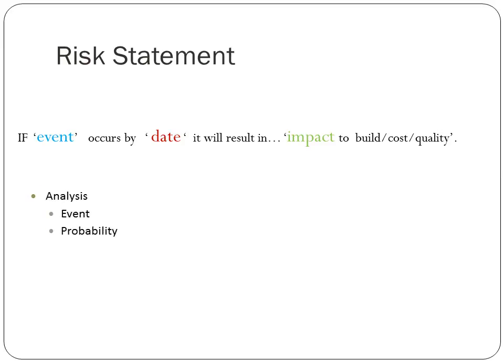Once we have the risk statement in hand, we do an analysis and look at the event. We assign it a probability — how likely is this to occur? We look at the impact, rate the probability and impact, and give this particular risk a priority ranking. In most projects, we can only address the top three or the top ten most significant risks, so we want to prioritize our time and our resources.